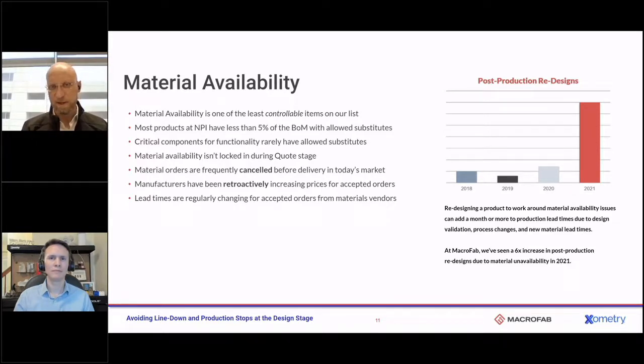Because especially in today's market, the distributors and the manufacturers aren't going to hold inventory until there's an actual purchase order out there, giving them the right to bill for that. And as a contract manufacturer, we can't issue those until we have a completed deal with you. Obviously, we work with our customers on strategic sourcing and ways around that. But typically, when you're working with a contract manufacturer, there's no guarantee of availability until the orders have all gone in and been accepted.